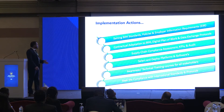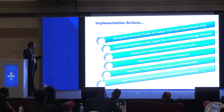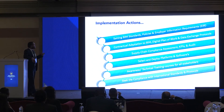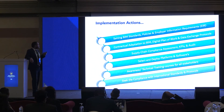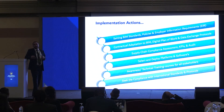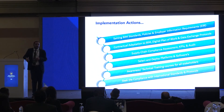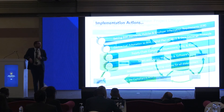For implementation actions — a quick to-do list for BIM implementation — this includes: setting the BIM standards, policies and the EIR; contractual adaptation to BIM; the digital plan of work and data exchange protocols; supply chain assessment; KPIs; the audit and the way you evaluate how your supply chain is doing their job; select and deploy platforms and software; awareness and technical training for all your stakeholders, not only your team, because whoever works with you should be aligned with your level. Seek compliance with international standards such as ISO 19650, which is published and can be used as a reference for the implementation itself.